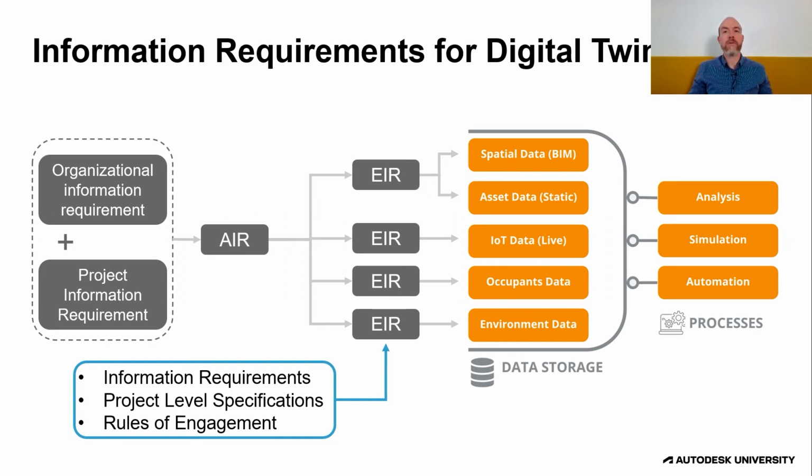There's no point in putting in a system that is a closed, proprietary, walled garden. It may run beautifully, but if you can't get access to the data later on to incorporate into your digital twin, it's going to be useless. And so there need to be rules set in place that people understand, so that if later on a master systems integrator gets involved or somebody is specifying a particular system, they know which things they need to do and which rules they have to comply with.